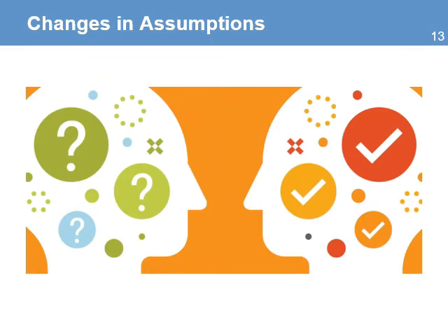Assumptions are the positive factors the project considers to be true, real, or certain. Every project assumption poses a potential risk that may not be true. The longer the project, the higher the probability that an assumption may change. For example, a project assumption that 100 participants will join the training sessions. If the enrollment only shows 50 participants, then there is a need to change the activity by either postponing to a later date or creating an additional session.